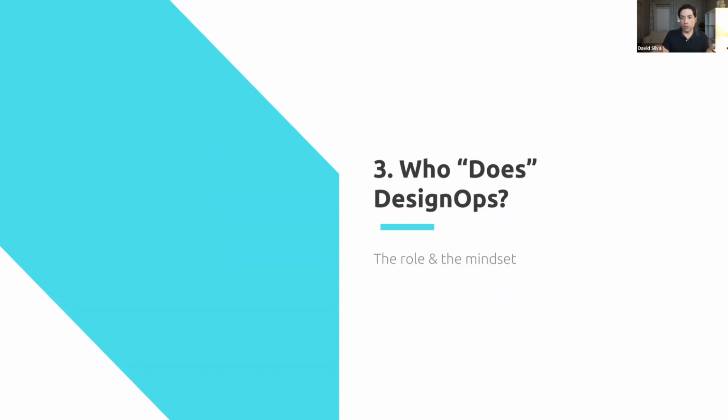So just to give you a practical example, when I was in this team before, that was creating a lot of graphics, we were creating tons of graphics all the time. This was to put on a website for promotion. So every week there was a new promotion. And what happens is that the marketing team will send us a request for these items, and they say, these are the list of promotions. We need an image that is more or less like this. So they give us a description. We need it by X date, and we need it in this format, because they could be different. So that was the process of the request.